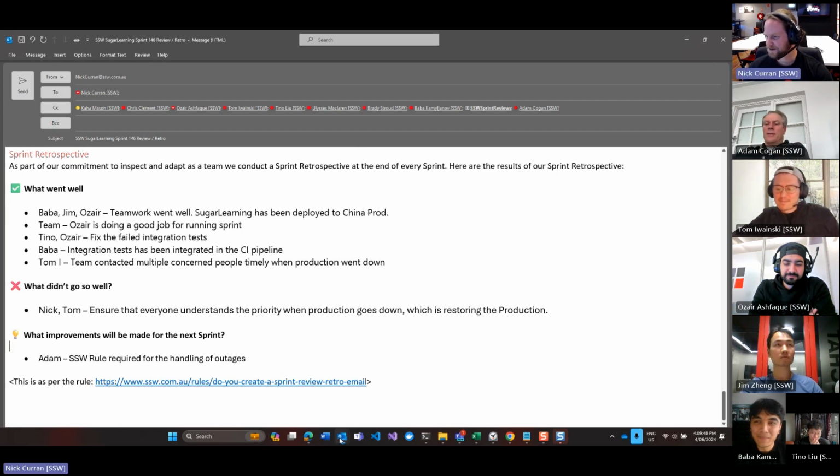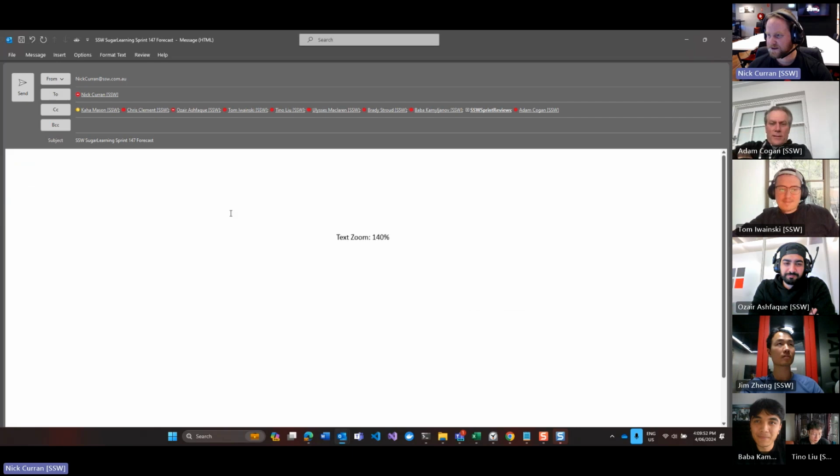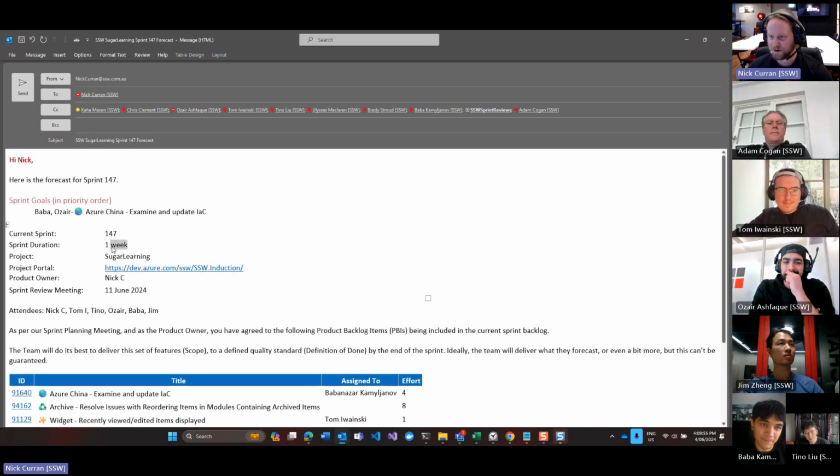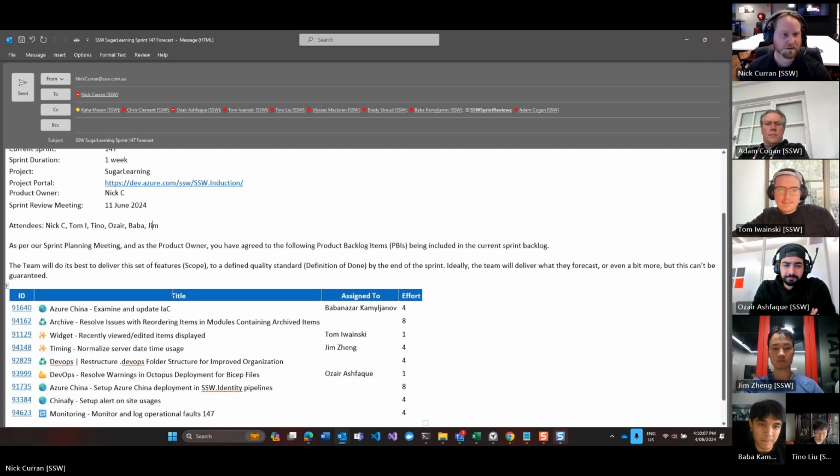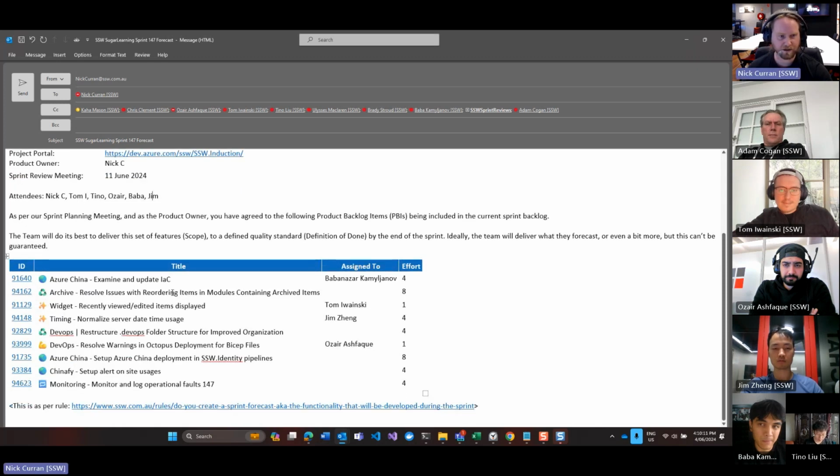All right. Continuing on to the forecast. So sprint forecast for 147. This is a 1-week sprint with the review on the 11th. One thing to note with this sprint is that there is a public holiday in China. So there's less work than normal, but because we want to maintain a clear sight on the work we're conducting, especially in the current state of the China deployment, we're going to still make it just a 1-weeker rather than extend it to 2. So it'd be 4 days. For most of the team, yes. Okay.